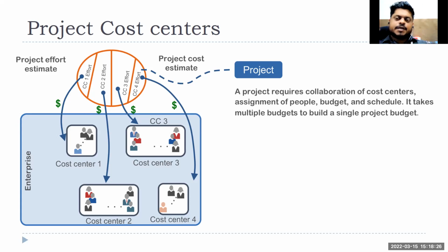And that is where, in the beginning itself, you have to make sure that every stakeholder for whom you are carrying out that project, you have talked to them and made sure in writing that they are going to pay the money for that. Otherwise, towards the end, you have already spent the money, you have contacted the vendor, the vendor has come to implement something, and the payment is not there. So they'll say, no, I did not agree to that, right?